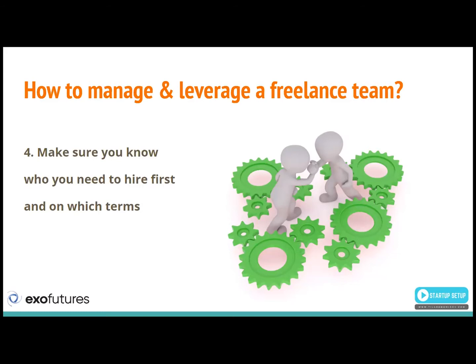And then there are the roles that are very part-time, but you really want them to be long-term with you. As I mentioned, for example, a quality assurance expert, because you need this person to really know your project inside and out. But then again, there is not enough work for them to stay for more than a couple of hours per week. But it's important to maintain this relationship for a long period of time. Also, if you're using, for example, a virtual assistant, again, it's very important to have somebody who has the same tone of responding to emails similar to yours, etc. And you want this person to be with you long term, even if it's on a very part-time basis.